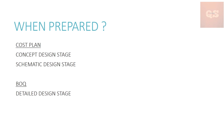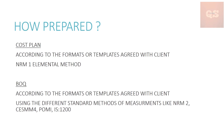Finally, during the detailed design stage, when you have all the documents and all the drawings, that is when you make your final BOQ — that is when the BOQ comes into the picture. This BOQ is sent to different contractors during the tendering stage for preparing their cost for carrying out the project, and then the successful contractor is awarded the contract.